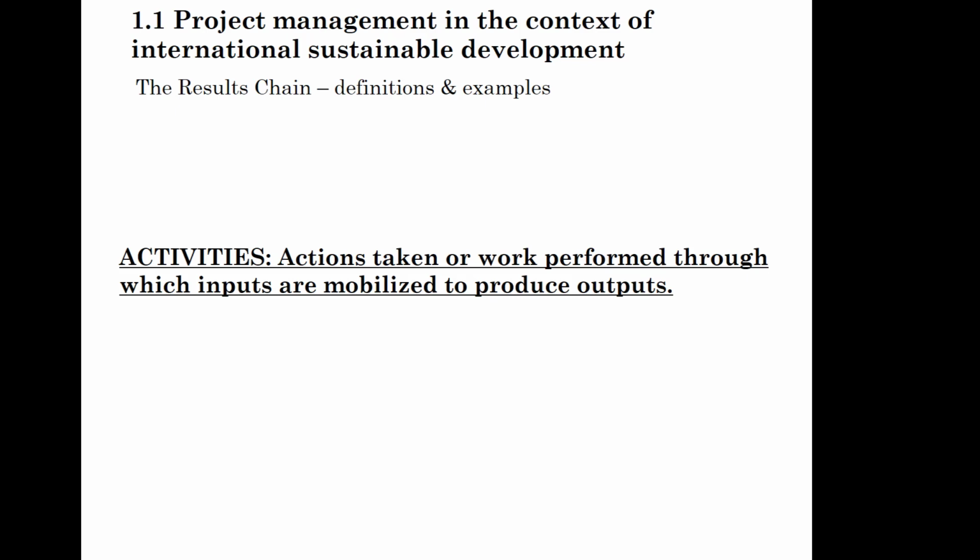Typical activities for this would be, for example, to conduct workshops with stakeholders where you make an assessment of the needs regarding capacity development, including consultation with male and female staff, paying attention to gender issues. We'll also be designing gender-sensitive training materials on soil and water conservation guidelines. So these are two types of activities that will then ultimately produce the output, which would be the guidelines for soil and water conservation technologies in a certain region, in a certain country.